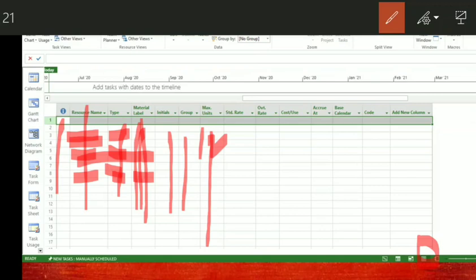For example, if a total of 20 laborers are available for the work and 10 laborers are active, in percentage you can show 50% of the people are working. If it is in decimal, you can show the number 10. So that is the difference here. If it is in percentage, you can change that to decimal by going to the options.